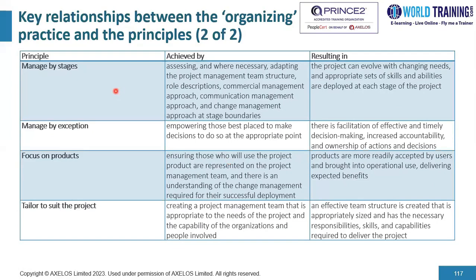Now, in the context of management by stages, this particular practice would be achieved by assessing and, where necessary, adapting the project management team structure, role descriptions, commercial management approach, comms management approach, and change management approach at stage boundaries. Now, as we move from one stage to another, there is a change in the kind of people that we need to work with, the suppliers that we would need to engage with, the kind of communications approaches might vary, and therefore there's a need for us to make sure that we correlate this particular practice to this principle.